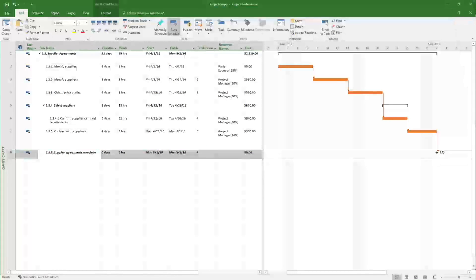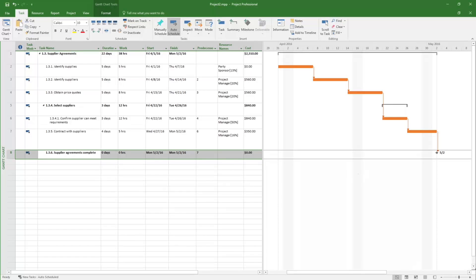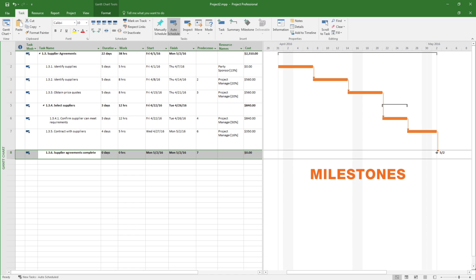In addition to activities, the project should also include milestones. A milestone is a significant point or event in a project. The milestones are not used to determine project durations as they consume no time.